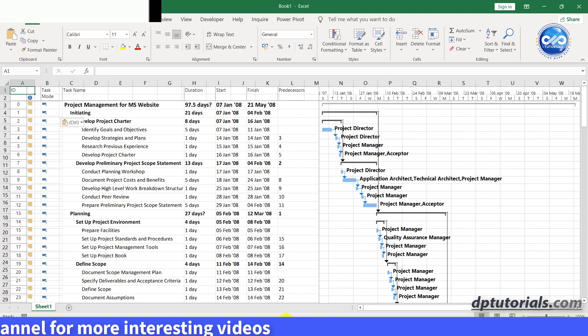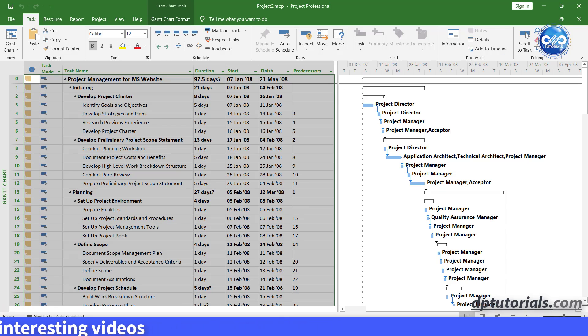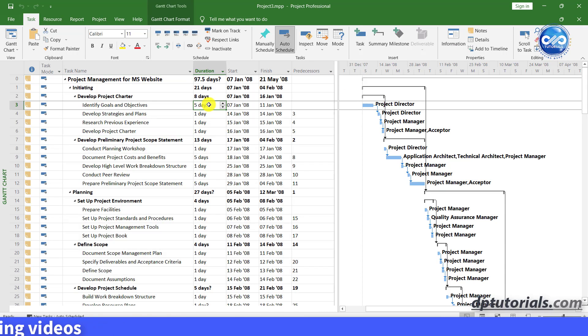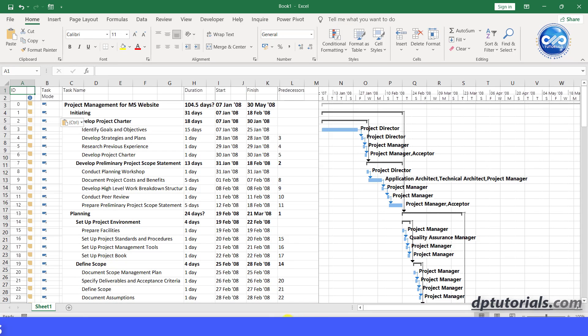To check this, go to MS Project and change the duration of the first activity as 15 days and come to Excel and you can see the change showing here like this.